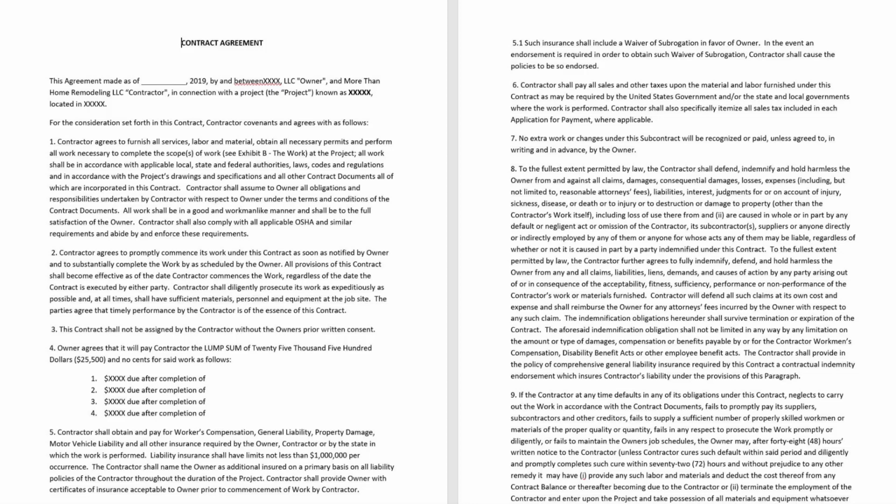So, don't assume anything. You need to thoroughly think through what it is that needs to be done. And if you're not an expert in construction and really don't know, then I recommend you have a property manager or someone more experienced write this stuff up. Because if you get into a scope where you missed a lot and there are a lot of change orders, your price is going to go up 20, 30, 40%, which can kill the equity you have on the deal. So definitely not for those lighthearted and not ready to go on the roller coaster ride, because renovations are definitely a roller coaster ride.